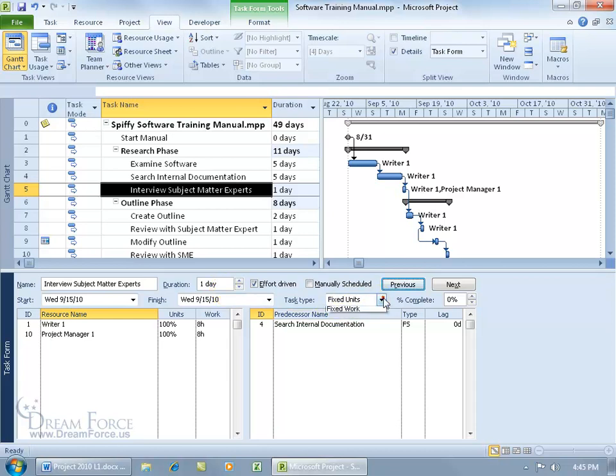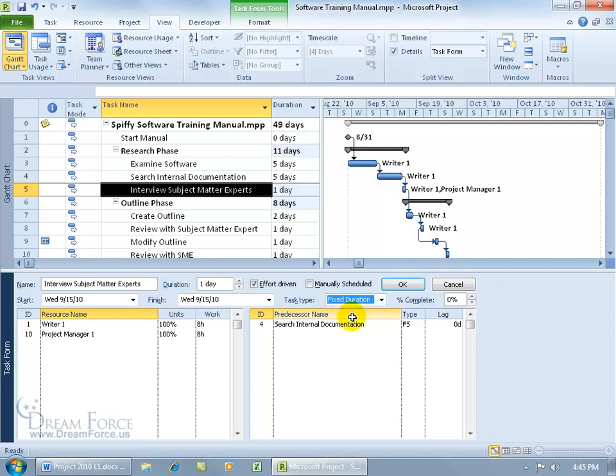You also get fixed duration. Assigning additional resources, it of course won't change the duration because it will be fixed, but instead it will shorten the work and/or units. And then you've got, well let me choose fixed duration, and then you can go ahead and see that effort driven, well it's checked by default because that's what I had previously.